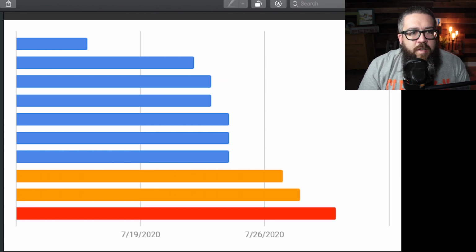Notice what this thing's doing. This aging chart is telling you. So down at the bottom, you see the red. What that's saying is that, hey, this thing has been open longer. You've been working on it longer than any one of the stories previously. So what gives? Right? And so that's the point, right? Immediately the bar is just like, hey, I'm red.